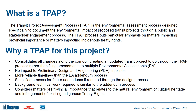So why a TPAP for this project? The TPAP is a streamlined environmental assessment process. Rather than filing addendums to multiple environmental assessments previously completed, this approach would consolidate all changes along the corridor, creating an updated transit project to go through the TPAP process. There will be no impact to the preliminary design and engineering timelines. The TPAP is designed to expedite the EA process for transit projects and have more reliable timelines than the EA addendum process.